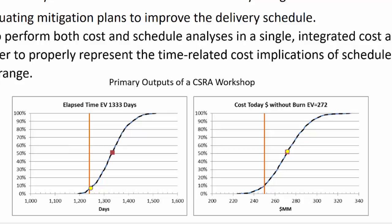Similarly, on the right side is the cost. Here I've shown the deterministic value as being around $250 million, also in the P5 to P10 range. That's what most people experience, because both the schedule and the cost tend to be optimistic when you talk to the subject matter experts and ask them for a deterministic answer. Everything is going to be rosy.